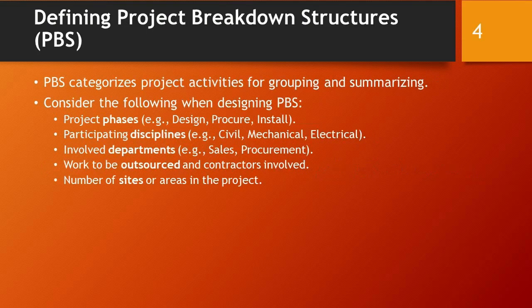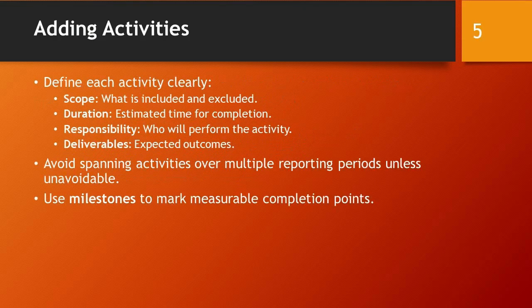WBS categorizes project activities for grouping and summarizing. When designing the WBS, consider project phases such as design, procure, and install. Participating disciplines like civil, mechanical, and electrical, involved departments such as sales and procurement, work to be outsourced and contractors involved, and the number of sites or areas in the project.